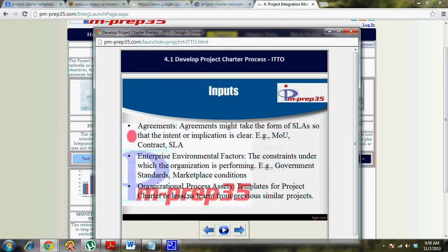So organizational process assets are an important input because we start creating each of the documents from a template, so that you don't reinvent the wheel. So you use a template and then tailor it to your project needs. So organization process assets are a main input, and the other reason, you might have some historical information or some lessons learned from previous projects, so you might want to reuse, and all these lessons learned might be a knowledge base which you probably will look up and leverage that experience from previous managers who have done this project.